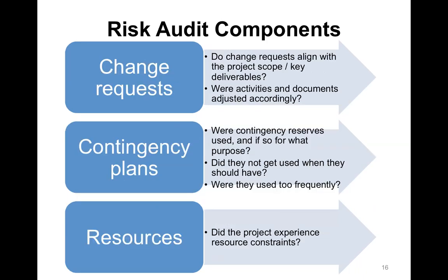Also, the change requests. Remember, change requests happen whenever we have to respond to a risk, whenever we have to implement a plan, whenever we have to make changes during the monitoring and controlling phase that affect anything regarding the project that deviates from the plan, we have to implement a change request. So you want to make sure that you keep records of those change requests, because if you get audited, or if you're the auditor, either way, change requests are going to be something that are going to be asked to be delivered to the auditor.